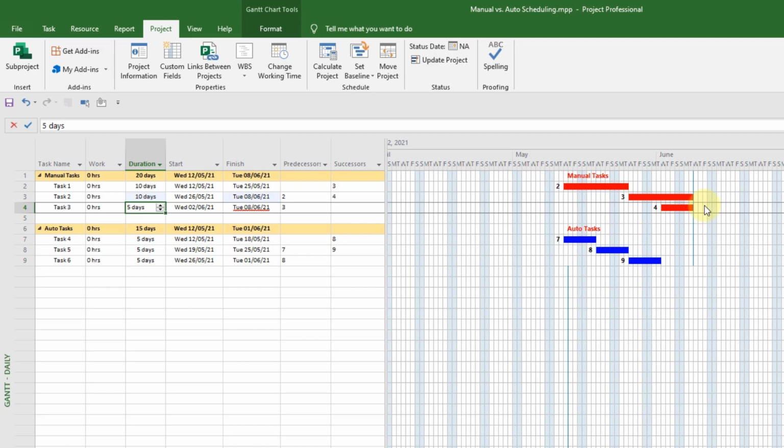Even if I made these manual corrections for this single change, if anything else changes again in the future, I'd need to go back and fix them again. And this is just for a simple chain of 3 manual tasks. One duration change in a program of even 100 of these tasks could probably keep you busy for a lifetime.